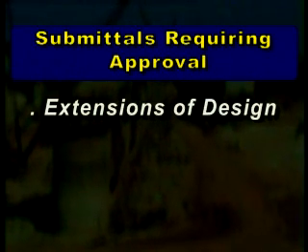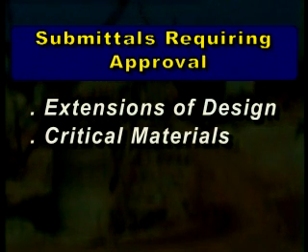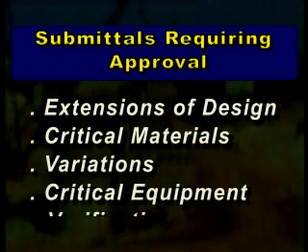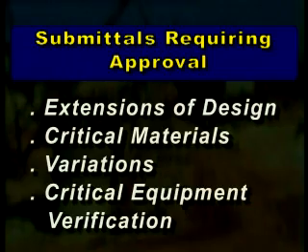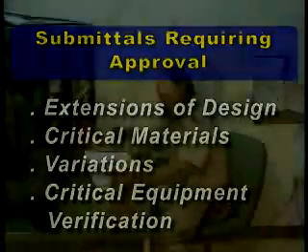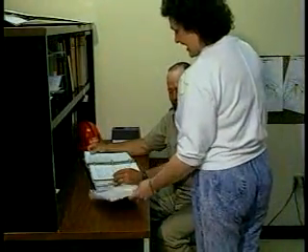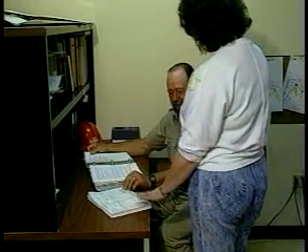Submittals that always require approval are extensions of design, critical materials, variations, or any involving equipment that must be checked for compatibility with the entire system. All submittals not requiring government approval are for information only.